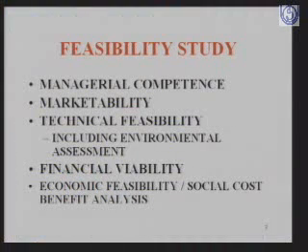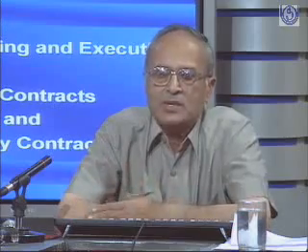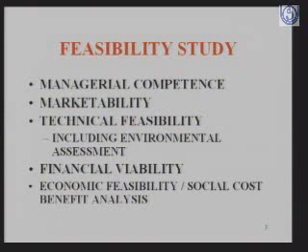What you do is, you study the marketability of your project, and if you find that there is a market, you go ahead. If there is no market, stop the preparation of the feasibility report there itself. So the next stage is your preparation of the technical feasibility. What I mean by technical feasibility is, I want to know whether I would be able to make what I